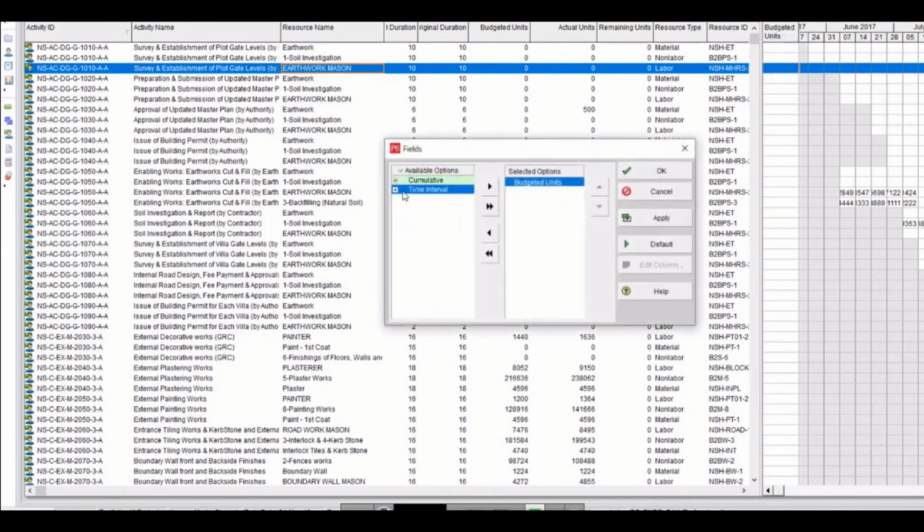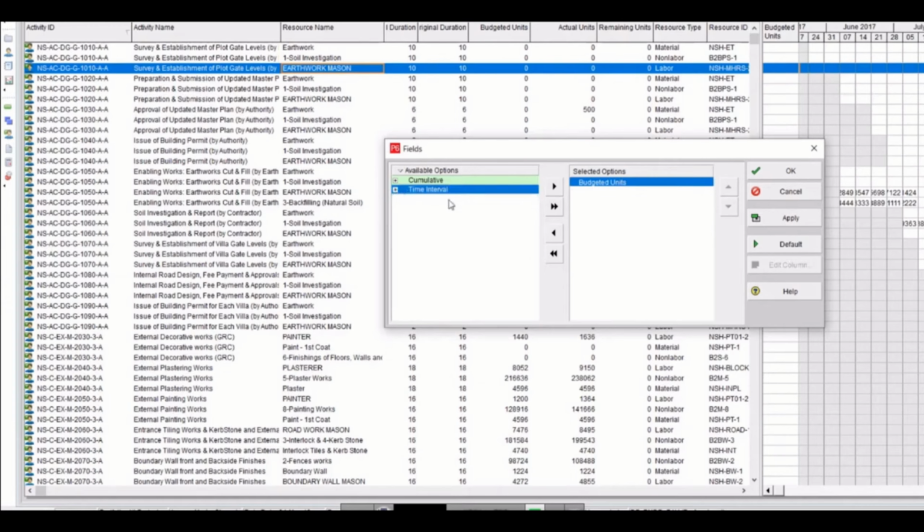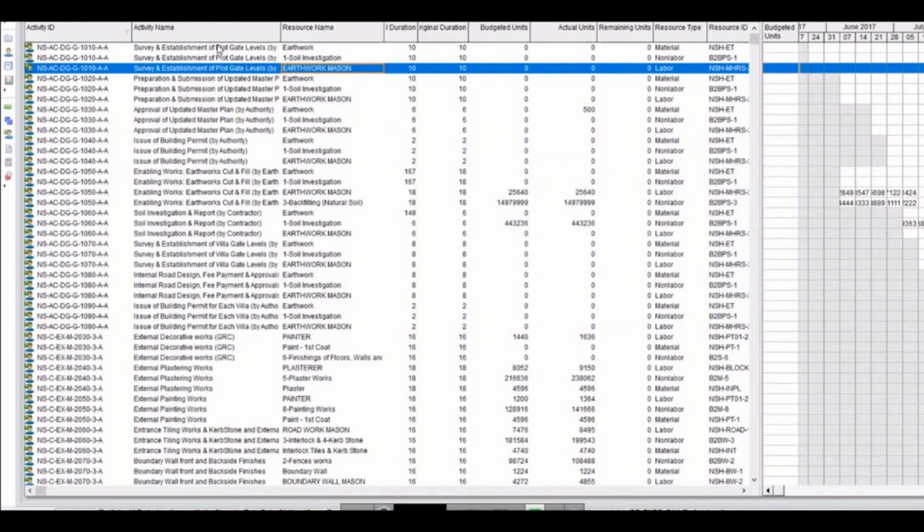So this tells me that I can never find the earned value related data here. If I go in here and check, see, there is no earned value related data. Cost data, cost will be anything. It can be budgeted, it can be actual, at completion, remaining, but it does not have the earned value. And earned value means it should have the planned value, it should have the baseline value, because baseline value is also the planned value. That is the earned value related data, and this does not have it. So now we will go into the reports.